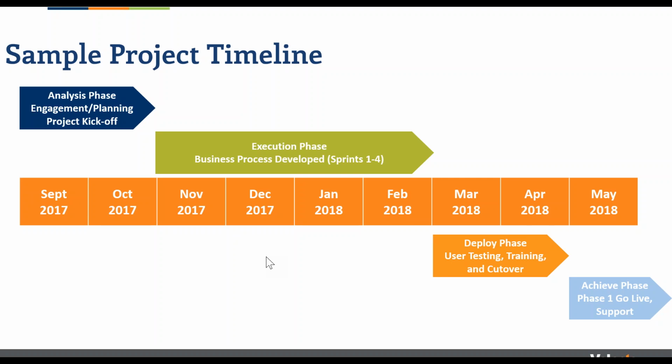One of the reasons that we like this, and we like it for our clients and have received positive feedback, is it helps to load level the client's activity during the project. So instead of calling you into a room for 3 weeks and saying, okay, we need to design this whole thing out, our design sessions will be a couple hours long on each business process. Testing will be a couple hours long, and so you're in a much better position to load level your resources to work with us throughout the entirety of the sprints.